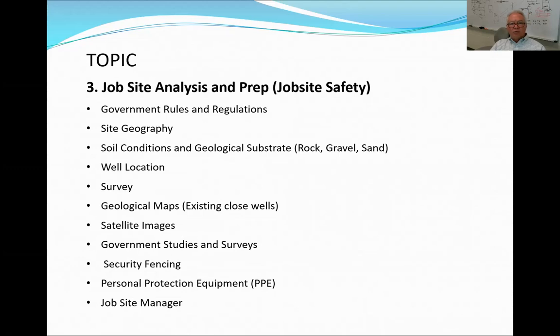Job site analysis and prep, and this is where job safety is real important. Know your government rules and regulations for doing a water well. We have lots of them here in the United States, especially here in Texas. You can't just go drill a well anywhere. You have to get permits and have drawings, and sometimes they want a test well drilled first, all kinds of different things.